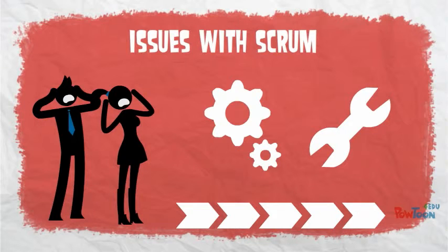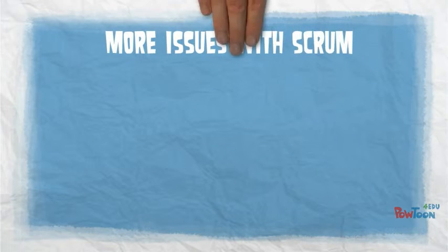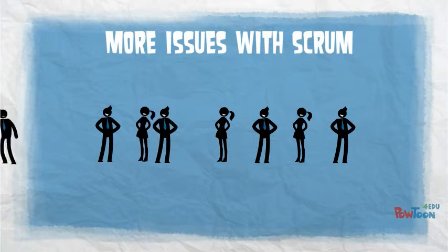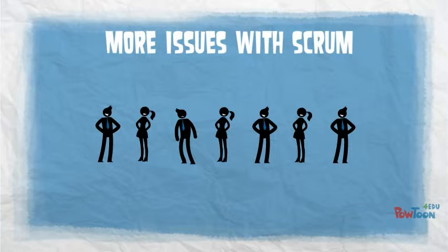In addition to the problems dealing with scope creep and changes to scope, Scrum development makes it difficult to adapt to changing team members during the course of a sprint. Due to the fast pace of the process, it is difficult to rotate new team members into the mix, especially when they are picking up where somebody else left off.